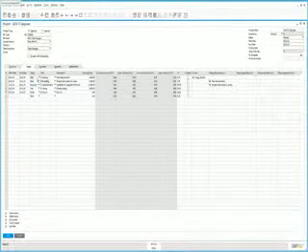For this project, we kick off the project with the start stage. And the task associated with this stage is the scoping task. And this is where we're actually going to map the customer requirements. Tasks, of course, can also be defined based on your project requirements. We then estimate a planned cost associated with this stage, and likewise you can see any invoiced or open amounts relating to this particular stage of your project as well.